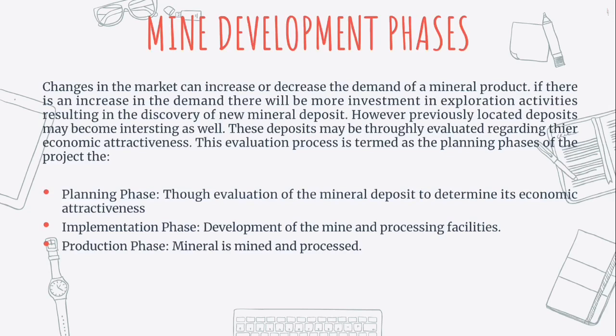The planning phase, through evaluations of the mineral deposits, determines its economic attractiveness. The purpose of this phase is the preparation of a feasibility report. Implementation phase: development of the mine and processing facilities. It also includes the mine development and is also known as the investment or design and construction phase. Production phase: mineral is mined and processed, which is the mining and ore processing. The result is the product is sold in the market.